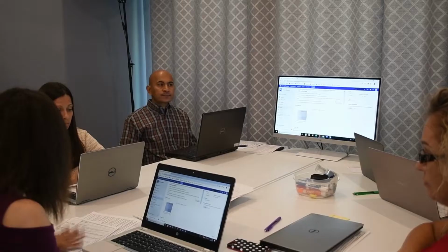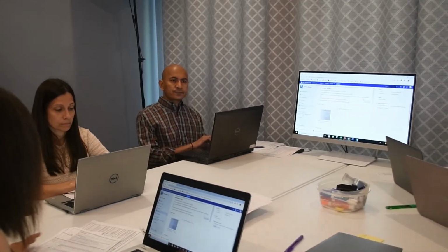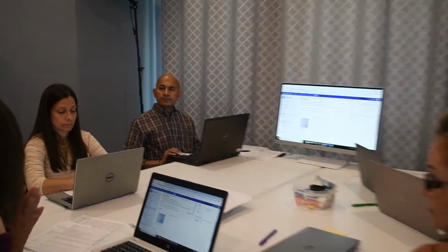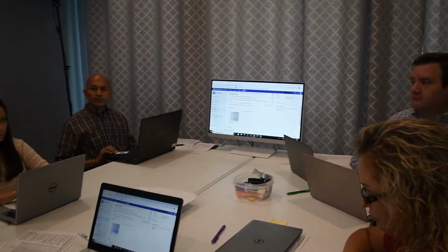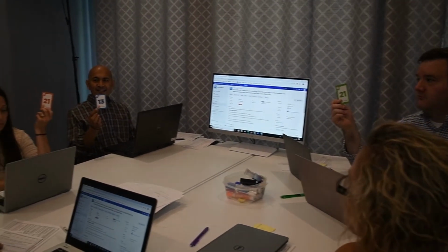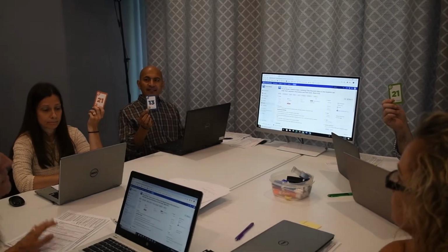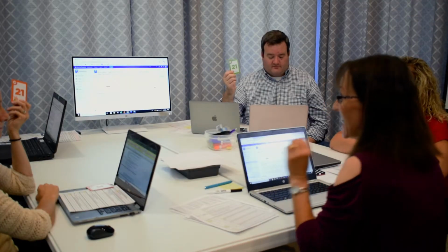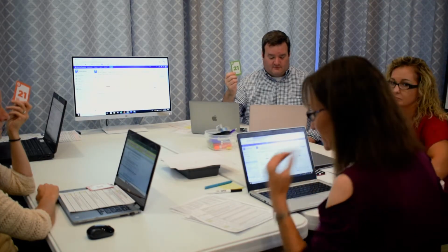Okay, so let's all put our points up, and since this is bigger, we might want to break it down. Are you guys ready? Yes. Okay, 1, 2, 3. 13, 21, 20. Okay, so you guys know 21s are not possible, and 13s I don't like. I hate 13s and always make you guys break those down.